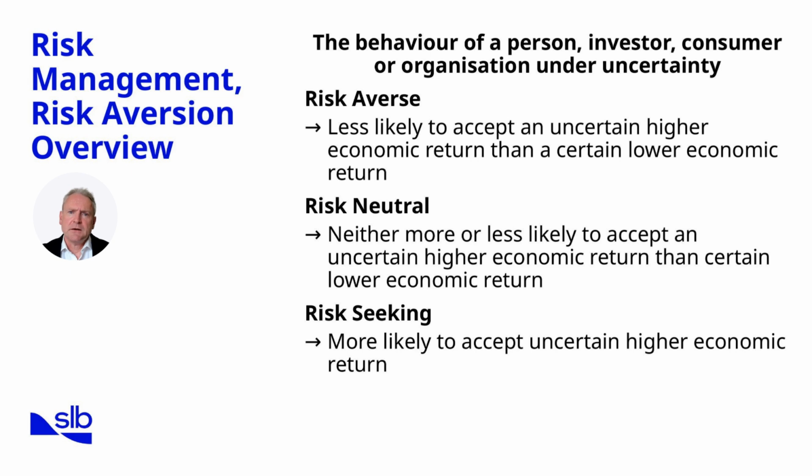Risk management is not only about technical tools, it's also about behavior. This slide introduces the concept of risk aversion, which describes how people and organizations act under uncertainty. A risk-averse decision maker will prefer a certain but lower return rather than take a gamble for a potentially higher but uncertain outcome. In drilling, that could mean choosing a proven, slightly more expensive mud system instead of a new, untested one that promises lower costs but carries unknown risks.